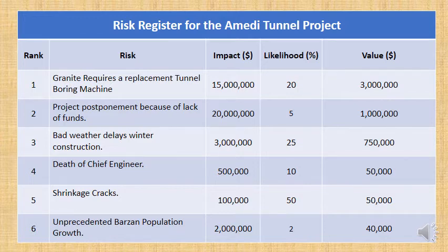Risk number 2 is if there is a postponement because of a lack of funds. Well, remember, if there are any time delays for big projects, that can have a very big impact on the value of a project, because time delays mean that you're losing a lot of external benefits. So remember, we're valuing external benefits here as well, because it's a public project.